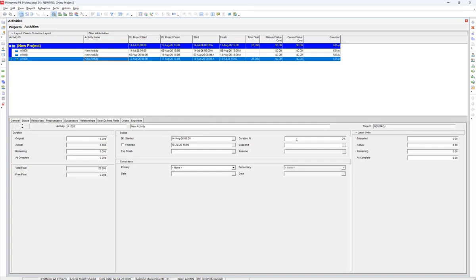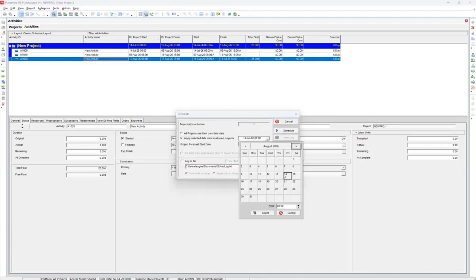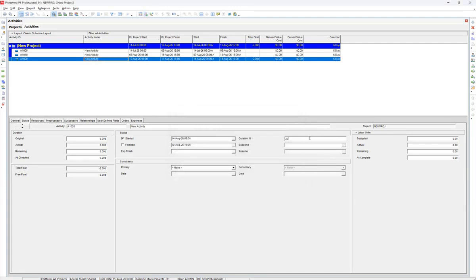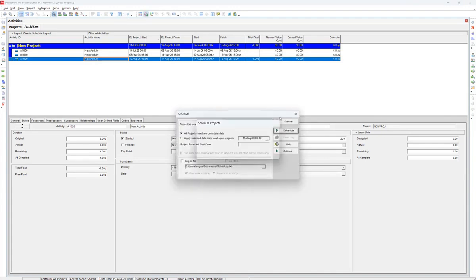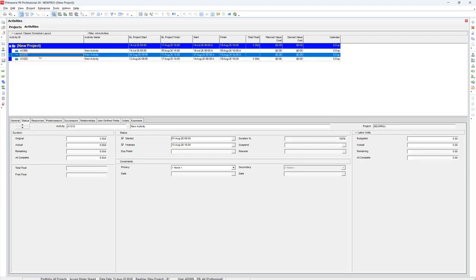And we'll give it a completion percentage. For example, let's just change this data first to be August 15th. And we'll give it a completion percentage of, say, 20%. So we know that we have delays in the project. It's supposed to finish on August 18th, the expected date, while it was supposed to finish on the 17th. And we know that this slip, since we are doing these calculations manually, was due to the activity which is 1010. Of course, if you have a large network with many activities, you won't be able to know this. Let's export this update.